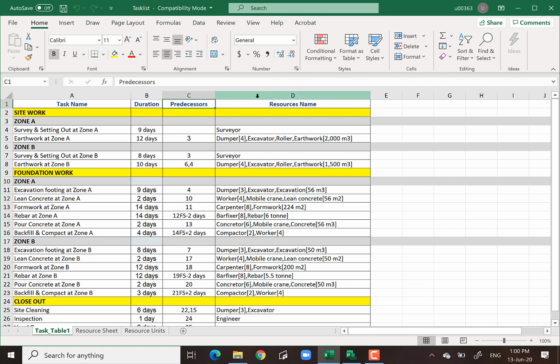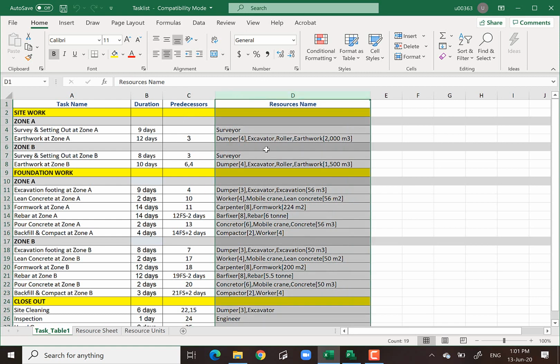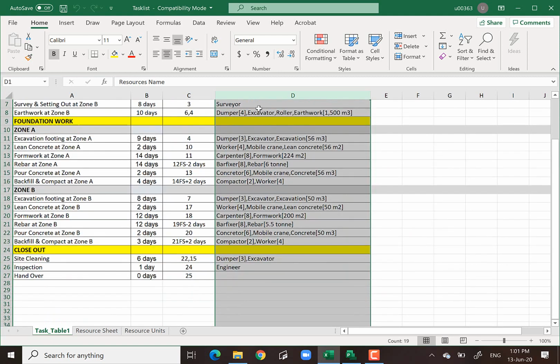And then resources. Again, resources I already predetermined. How do you get these resources? Is from your productivity rate. Remember, each of activity normally require man, machine, material, and the right method. And then that is when the cost will be generated once you already have man, machine, and material. And when you input certain unit rate with regard to those things, and then the cost will be calculated. Okay, so I already have all the data which I need, okay, for all of sample activities.